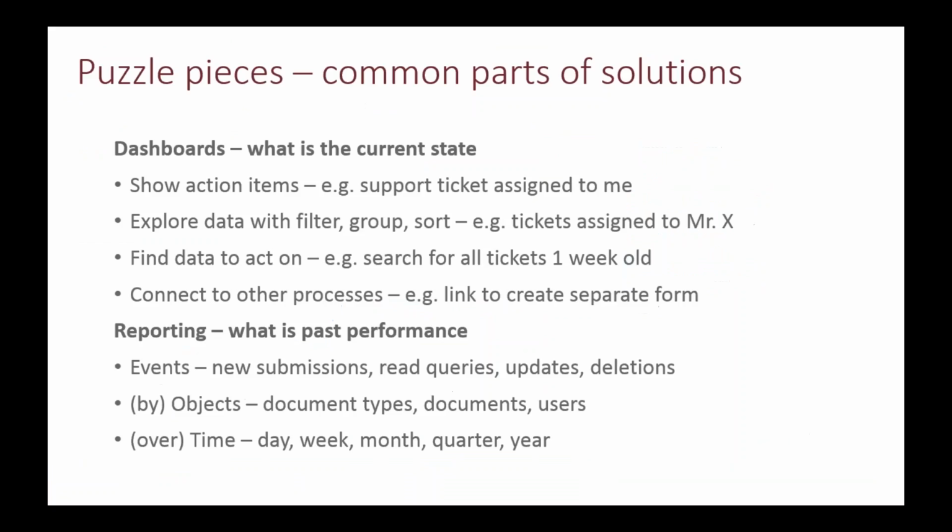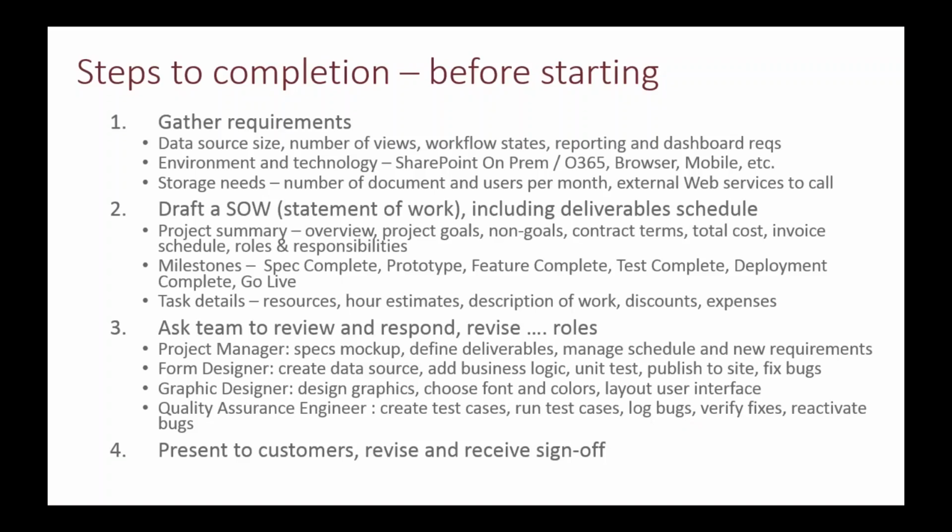Okay, so I've gone over all the puzzle pieces, and I'm going a bit slow, but the next thing, once you know what goes in your solution, is to set yourself up for success. The way to do that is to create a project plan. You need to gather requirements up front, create a statement of work with a schedule, pull a team together to review it, and then present it to your customer, whether internal or external, and get sign-off.